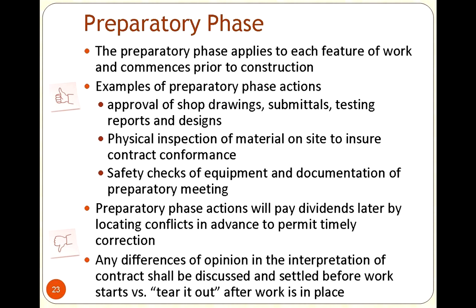And on that job that I'm using a lot of this presentation for, before we even walked in the buildings, we had to have all this documentation submitted that basically said, okay, this is what we're installing. These are the features of it. It's not going to be dangerous. All that information was ready before we ever even walked into the buildings, because it had to be.